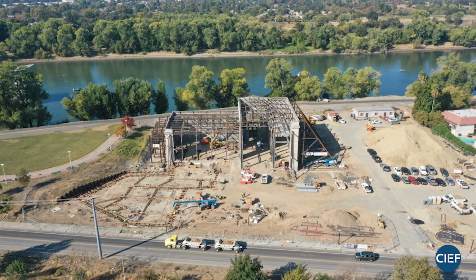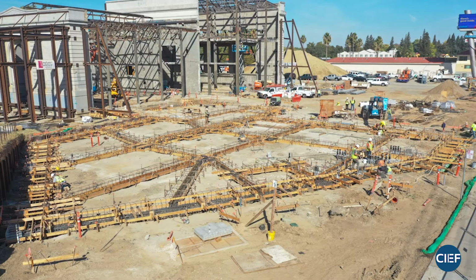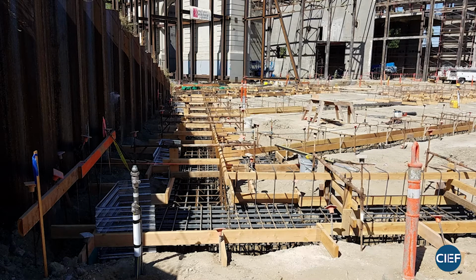This photograph shows the historic building after demolition was complete, with the footprint of the new addition taking shape. Here we have the Vasco Electric and Camblin Steel crews working on underslab electrical and rebar. Due to the sandy river soil on the site, the foundation system required displacement piles as shown in previous photos, and pile caps and grade beam tying them all together as shown here.